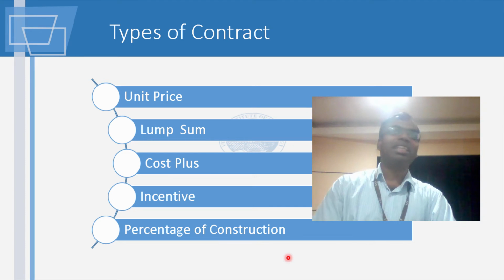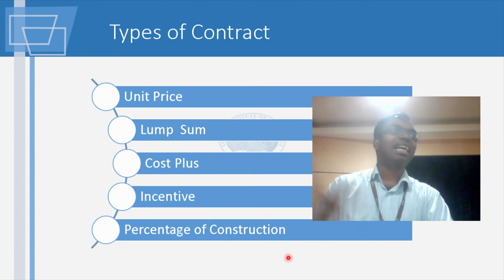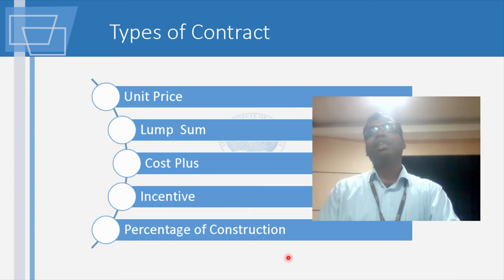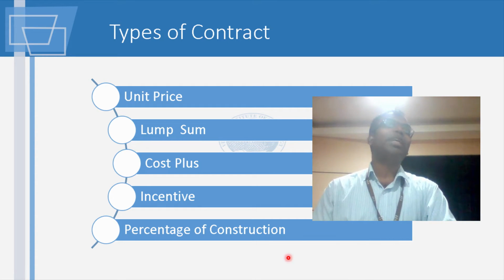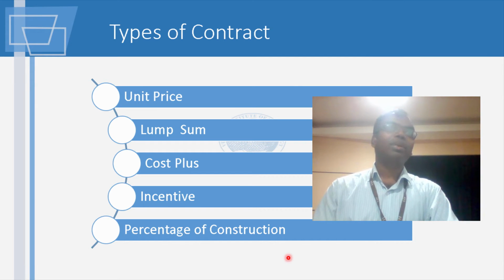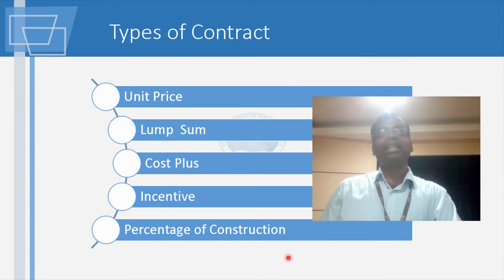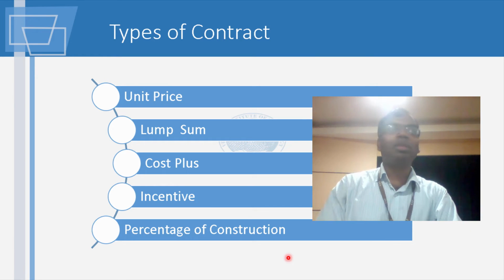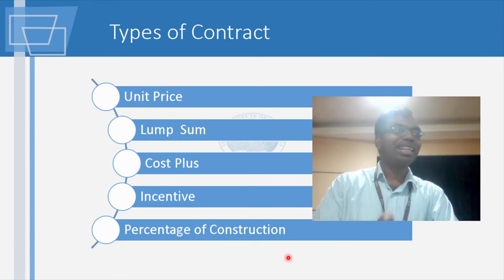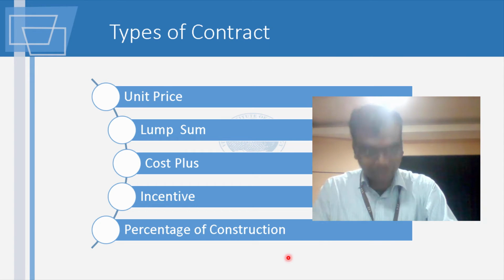Then there's that incentive. If you finish the project in time, only when this incentive is there, this crashing and all that, people are going to be looking at. You crash the project spending 3 lakh, and then you are paid an incentive of 5 lakhs. What's your profit? 2 lakh. Okay, you would have waited 2 months to get your payment, but you're getting your payment 2 months in advance. So it's an incentive for you in a lot of ways.